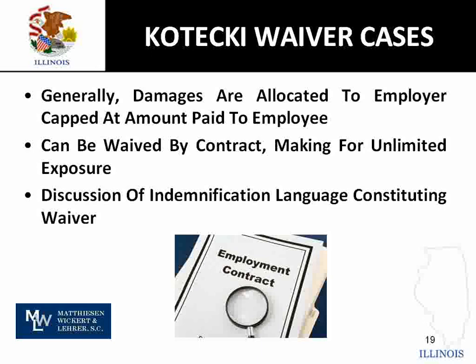However, as you can see on your screen now, the Kotecki cap, as we'll say, can be waived by contract. This makes for virtually unlimited exposure. These Kotecki waivers are often seen in construction contracts. It's an indemnity provision. Either it's going to apply to language in a contract that says a subcontractor will agree to indemnify and hold harmless a general contractor for all claims. That's going to be held as a valid Kotecki waiver, and it's going to uncap the damages that are going to be potentially allocated to the employer.